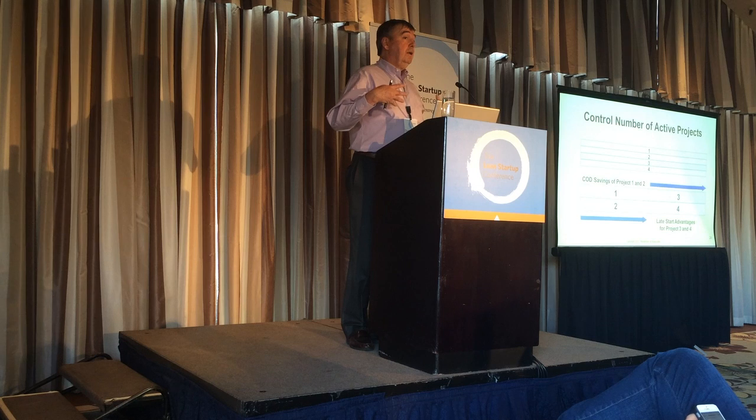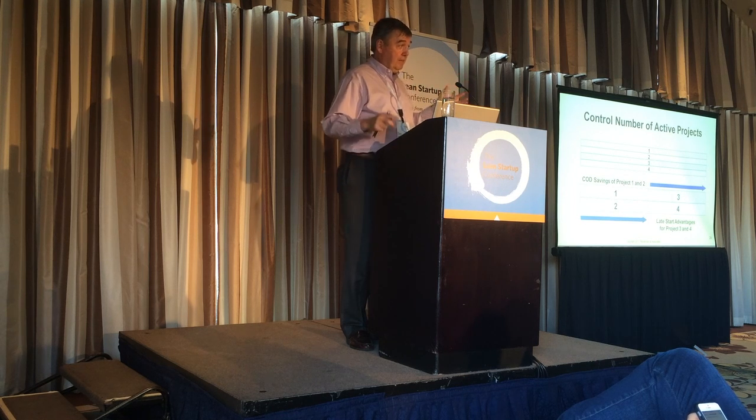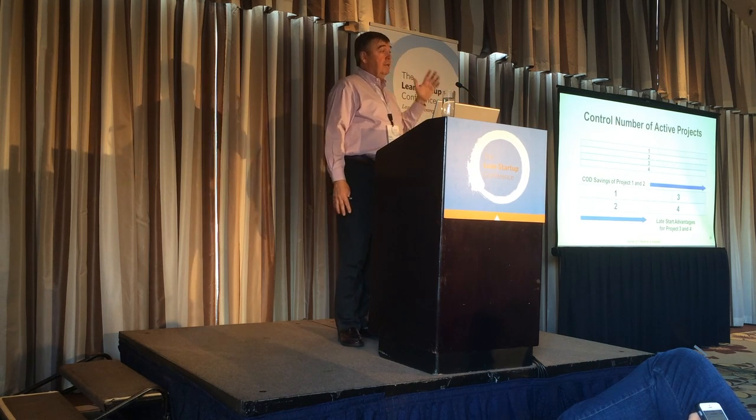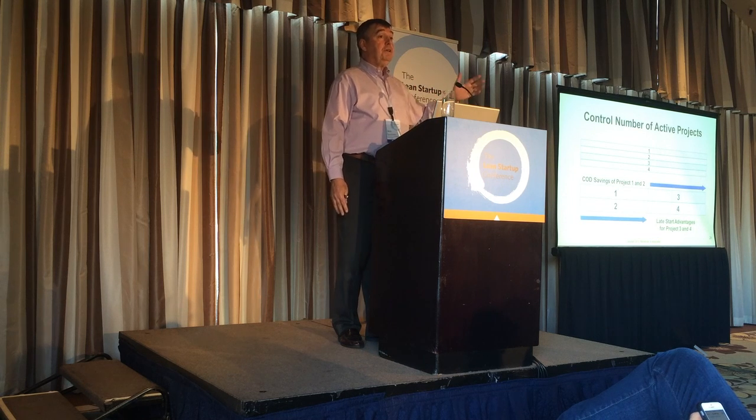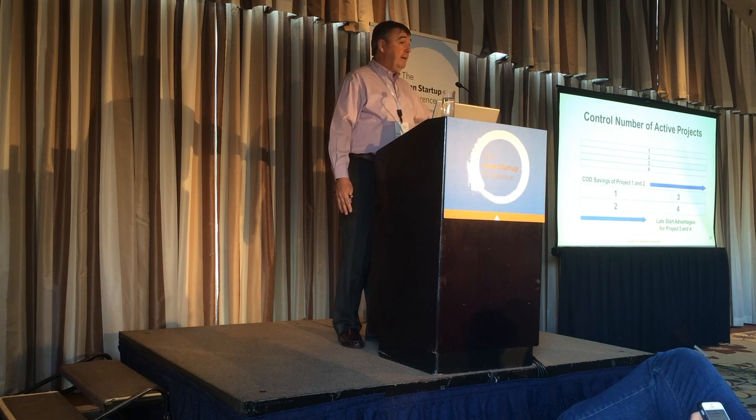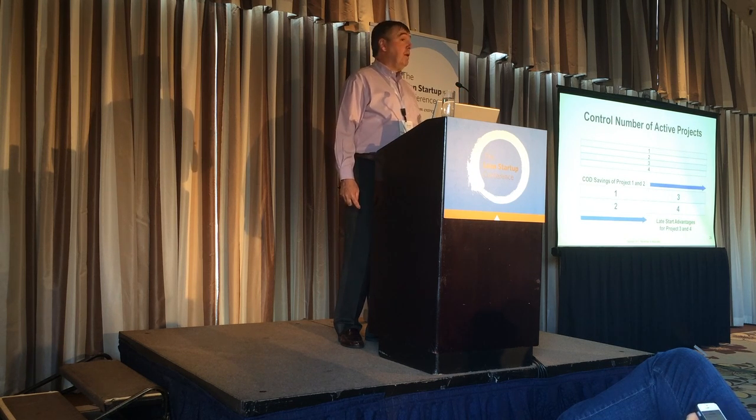Because in a capacity-constrained system, the fantasy a lot of senior executives have, and it seems quite intuitive, is the earlier I start, the earlier I will finish. That is not a true statement in a capacity-constrained system. If there are no capacity constraints, yeah, that's true. But in a capacity-constrained system, if the pump is pumping 10 liters a minute out of the other end, that's going to determine the rate at which stuff is coming out the other end. It's as simple as that.